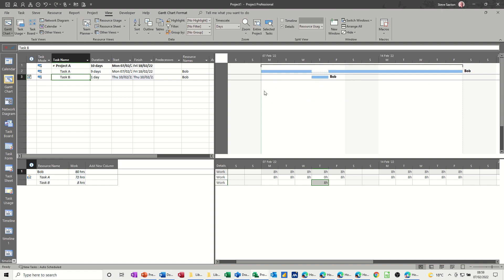Quite often when you add a resource to a task, they're not actually doing that task for the whole eight hours a day. Sometimes — especially builders and tradespeople — they're only on the job for two hours a day. So that's where task usage comes in. You just type two hours, two hours, two hours, two hours, and then you might be able to do another task at the same time.